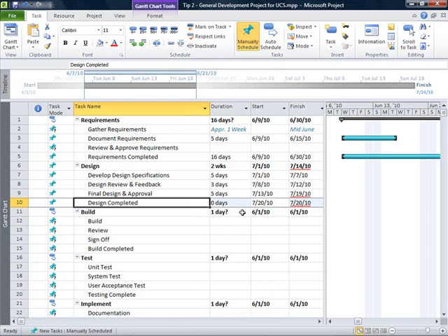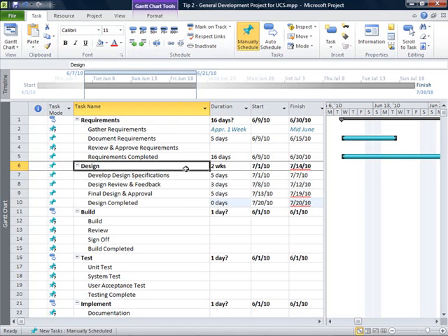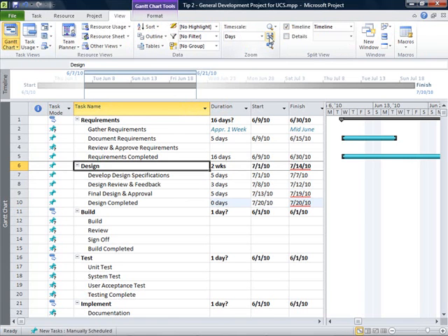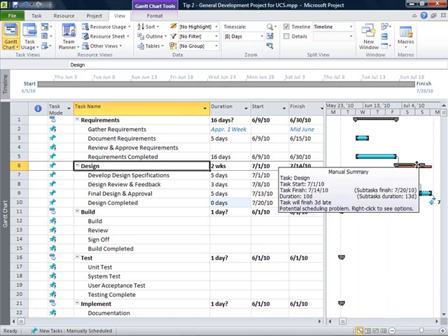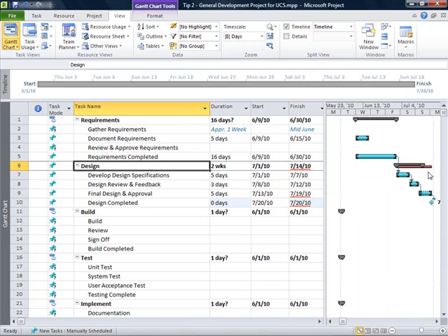And you'll see that Project is calculating this out to 720, which is a little different than your summary estimate of 714. And in fact, if I go to the View tab, there's a nice little option here called Zoom Entire Project, so I can see it all in one place here. You'll notice that up here I have my summary bar, which is represented by the black bar, and then I've got the roll-up of my details extending past that, indicating that there is a problem. And that's why that red squiggly line, or the red wavy line, pops up.